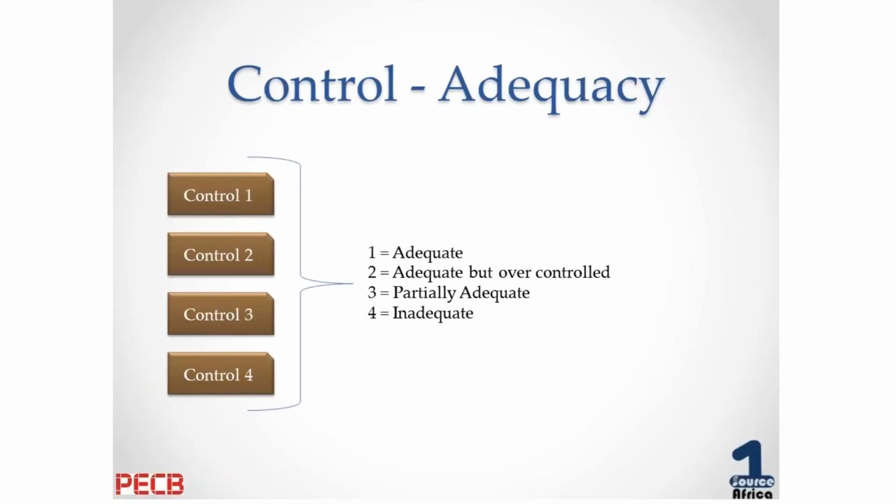Now the first step we have to look at is the adequacy of these controls to a risk. So we look at this basket of controls, and we have to end up with an opinion, and it could be through tests, it could be through expert opinion. Should these controls all be effective? Would they be adequate to manage my risk to an acceptable level? So it's generally referred to as evaluating the control environment adequacy.